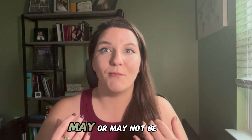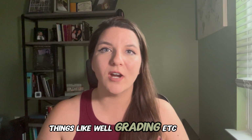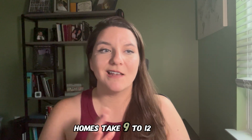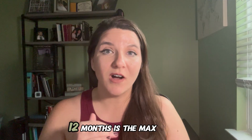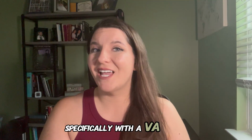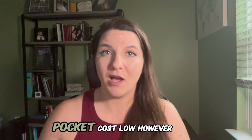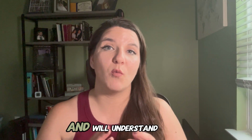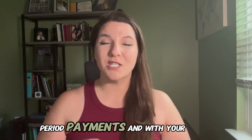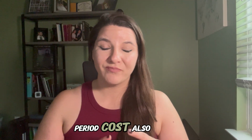Site prep are things that may or may not be included in your builder's original plan to build the house, things like well, grading, etc. Most site-built homes, that's your regular stick-built homes, take 9 to 12 months on construction. 12 months is the max for a one-time close loan on what the construction period can be. Specifically with the VA, during that period, you are not making any payments. That's a good thing because it keeps your out-of-pocket costs low. However, no money is ever free, and lenders will be financing your construction period payments in with your loan. You have your construction cost, your land purchase, your contingency fee, and construction period cost.